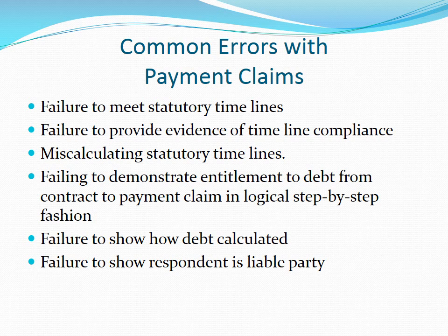Failing to demonstrate entitlement to debt from contract to payment claim in logical step-by-step fashion. Failure to show how the debt has been calculated, and failure to show that the respondent is the liable party.